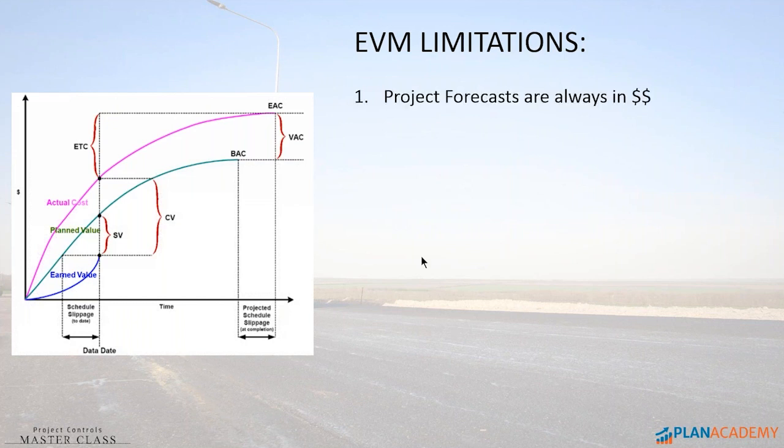There are some limitations, though. Like I was showing you, those forecasts of the project are always in dollars. The estimate to complete the project — there are a couple others that relate to schedule — they're always in dollars. So that's a problem for us because we want to know what it's going to be in terms of time, in terms of duration.